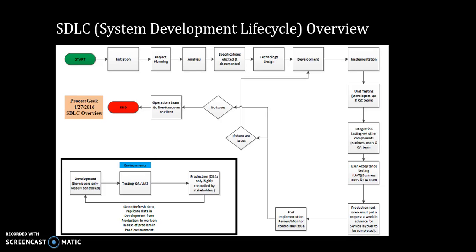Validating scope is a process in the project management lifecycle. Don't get confused with the SDLC here, but this is a tie-in to the project lifecycle. So you must validate scope, and all of these steps that I'm pointing to, unit testing, integration testing, user acceptance testing, are all part of the validate scope process. Essentially, what that means is you're trying to figure out, yes, this is what we have delivered based on the requirements that have been spelled out, that we have agreed upon.